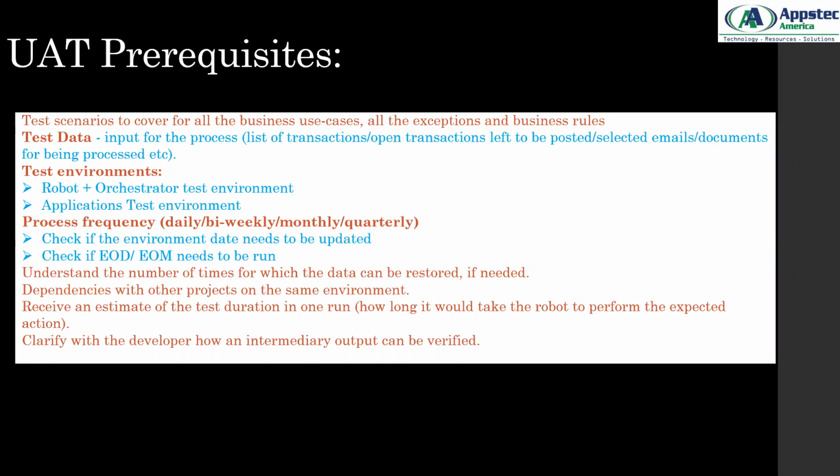The entire project, if it's high complexity, takes a minimum of 6 weeks for the bot to be tested, developed, and moved to production. A medium complexity project sometimes takes 3 to 4 weeks, and low complexity projects generally take 1 to 2 weeks. But these are standard estimates, and nothing is mandatory. Every company has its own policy, and every client depends on how the RPA framework is designed for them, so it would vary on that as well.